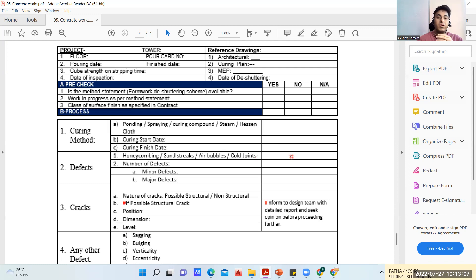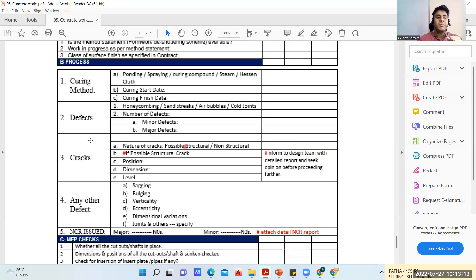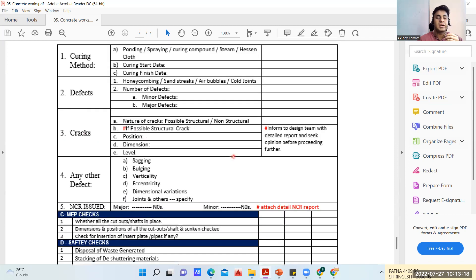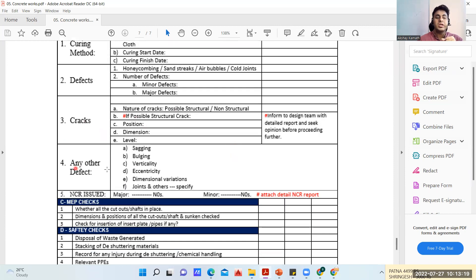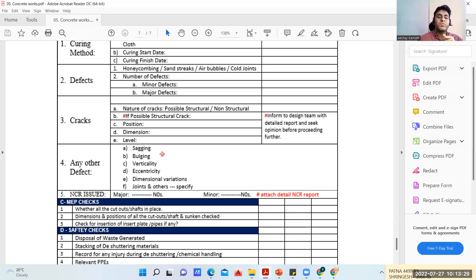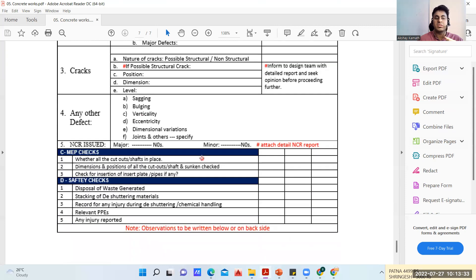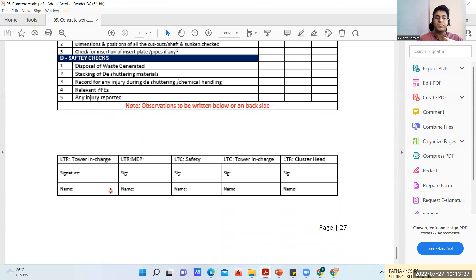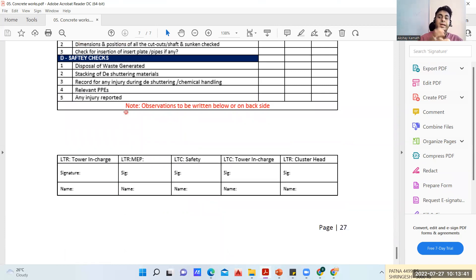Honeycombing, sand streaks, air bubbles, cold joints - if it is there, if it comes, then we have to write it here, then we are going to do a repair to that just in case. Any crack - what is the nature of crack, all those things you have to write it here. Any other defect like sagging, bulging - bulging happens when you are not properly fixing the formwork. Due to the concrete putting that lateral pressure, your shuttering may bulge. Then eccentricity, verticality, all these things. Again of course MEP checks and your safety checks will be done.